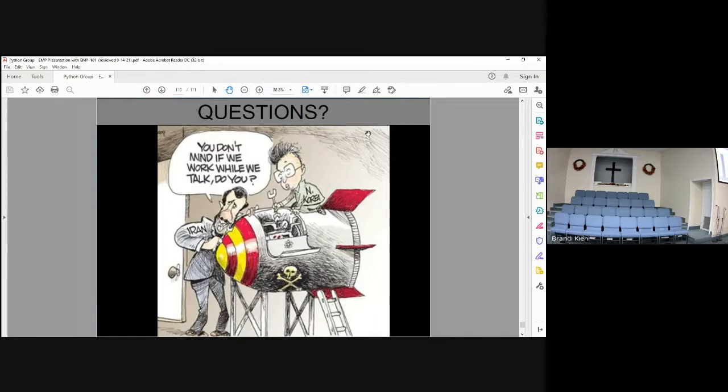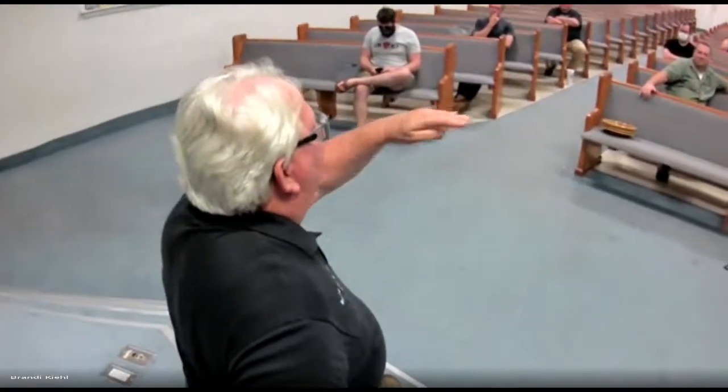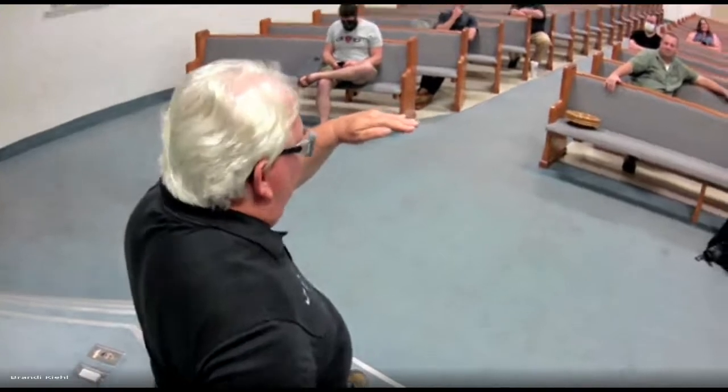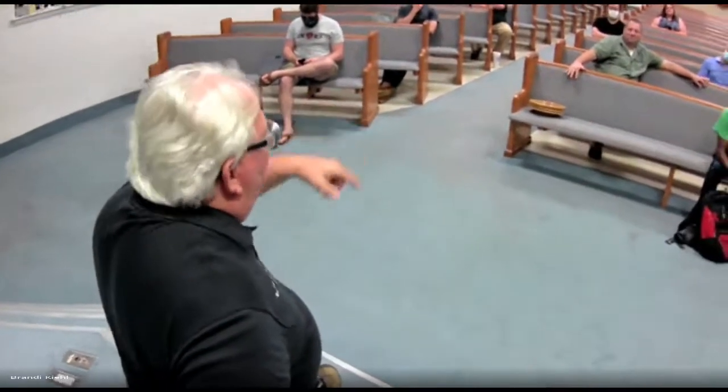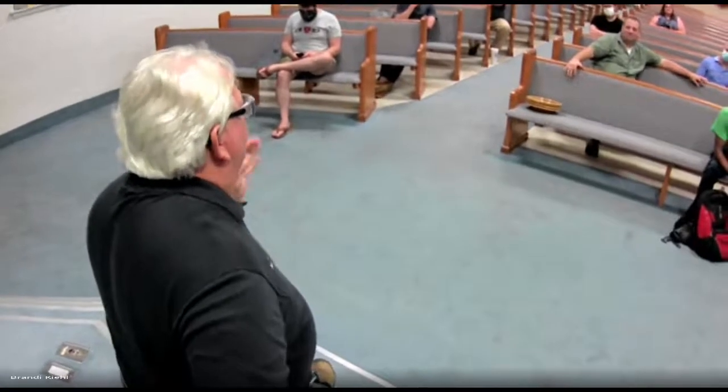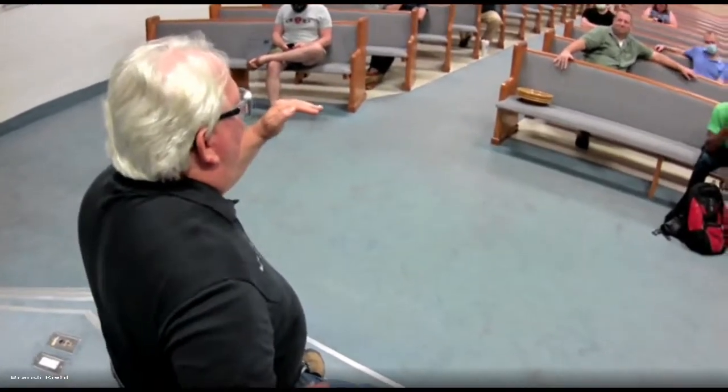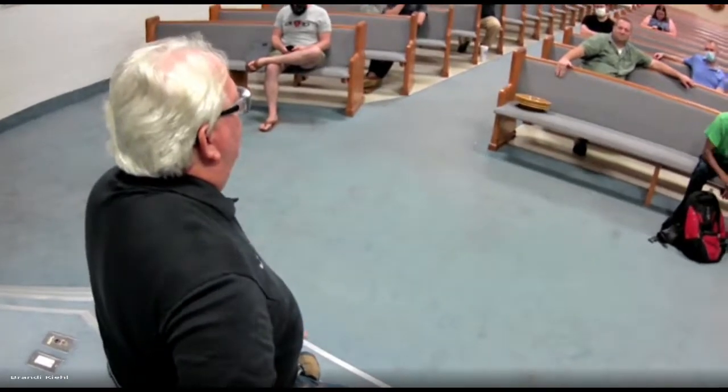It's a huge deal. And when you're planning for an emergency situation, basically you break your subject down by how severe is it, how likely is it, and there's one more. I'm running out of energy. But anyhow, one of those things is at the lower end of the likelihood scale, but the severity of what happens if it does happen is huge. So multiplying those factors together should make it apparent to most intelligent people that, no, this doesn't have to be priority 1, but it ought to be up there somewhere, way above where it's at.